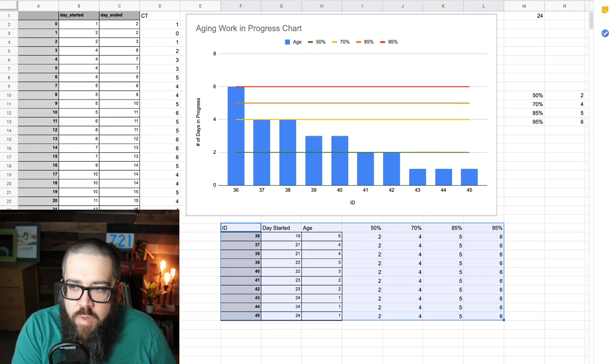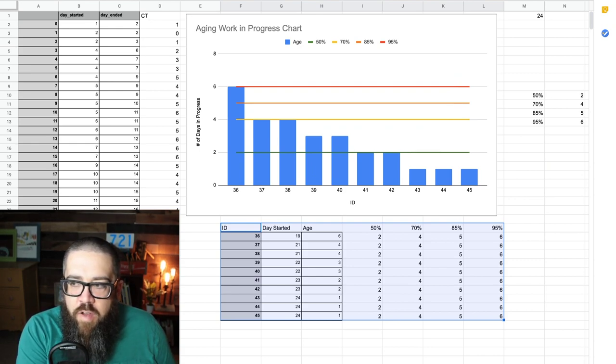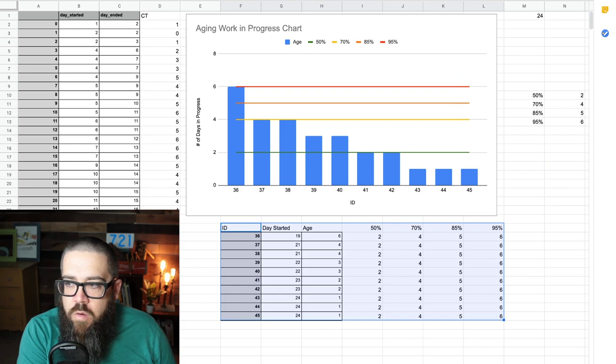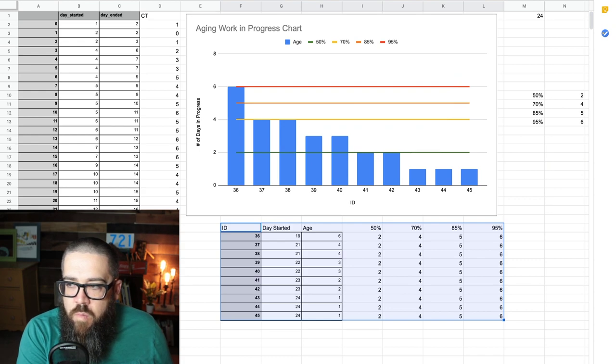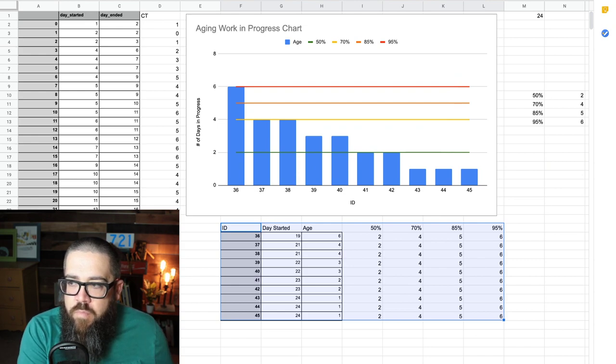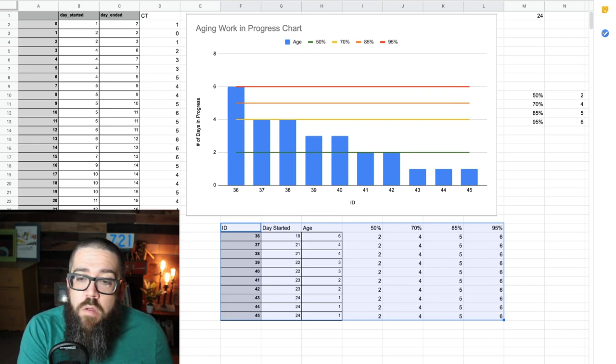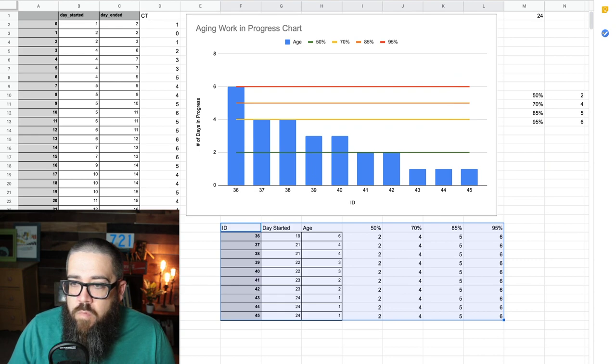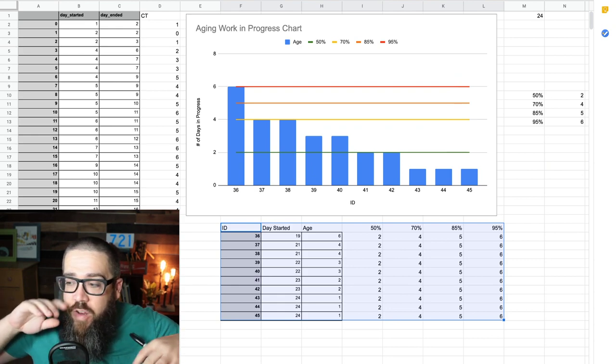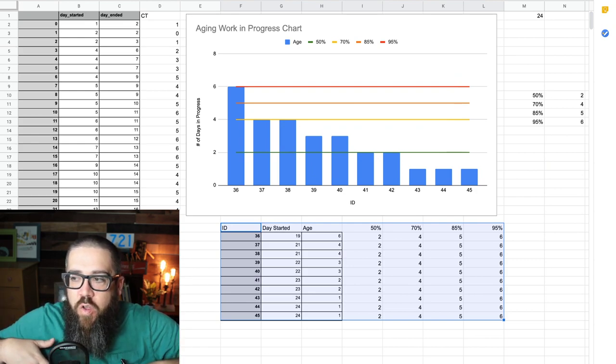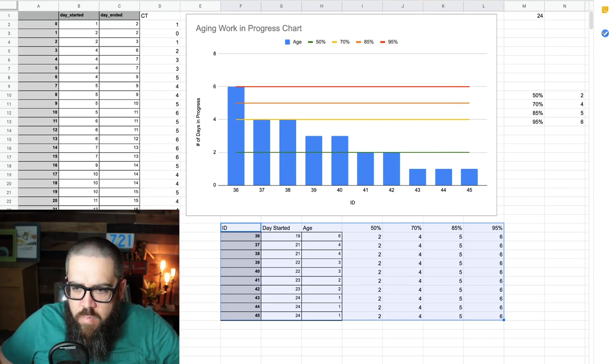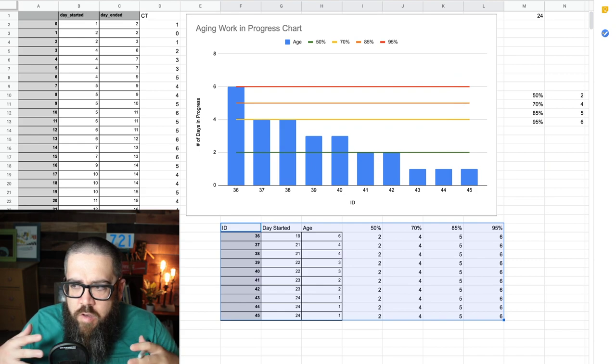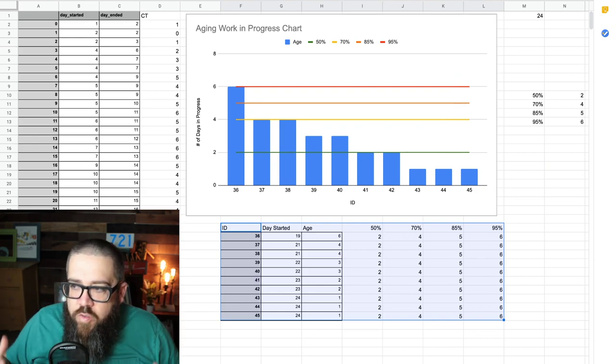Look at where that 95th percentile line is on that first bar, item 36. So, the 95th percentile, meaning, and you can see this over here on the right, meaning that 95% of the items before this were shorter in their cycle time. This means, the team, outside of 5% of the time, and by the way, 5% is like statistically never, just for those that are playing along, have never seen an item take this long.